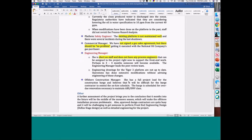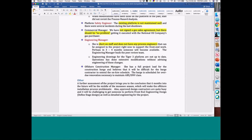And then the construction manager — this is offshore — you're going to need some kind of work barge. This individual tells you you're not going to get one in the time frame you want. And then to further complicate things, in the next six months you're going to be in the middle of the monsoon season. So I'm guessing this is somewhere in Southeast Asia. It's going to be quite difficult to do anything.